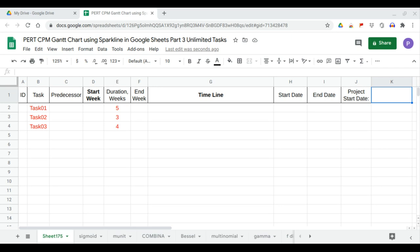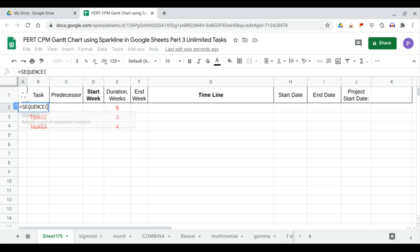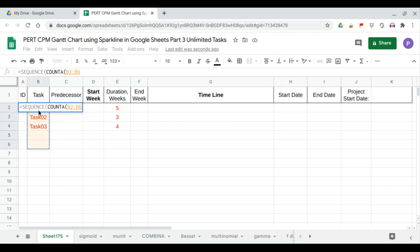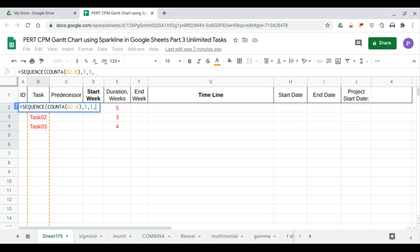Let us prepare an expandable PERT-CPM Gantt chart, starting with three tasks. We begin with the task ID, which is a COUNTA sequence of this ID for the entire column B, incremented by one starting from one.